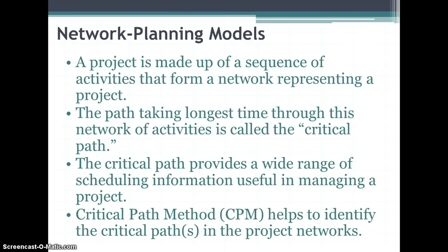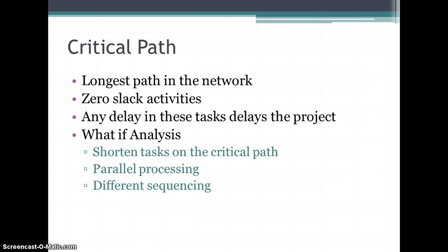So quickly, to recap, the critical path is the longest path in the network. It has all zero slack activities. But the key element here is that any delay in these tasks will delay the project. That's why it's important for us to understand what the critical path is.